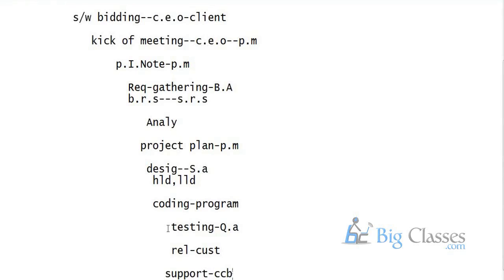The SDLC starts from requirement gathering. First, software bidding — the CEO (Chief Executive Officer) goes to the client site and finalizes the project. Next, kickoff meeting — the CEO comes back to the organization and arranges a meeting with the project manager to select the project manager. Once the project manager is finalized, the project manager prepares the first document called the Project Initiation Note. Then requirement gathering begins.